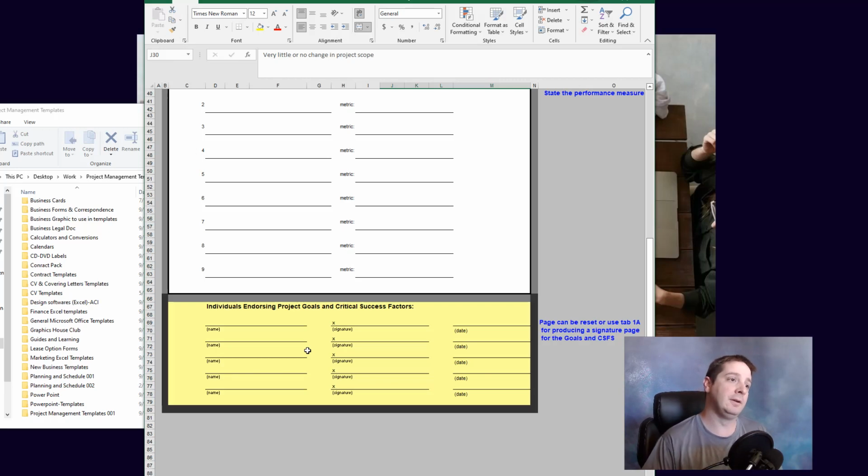That way, the people that are responsible to have this project succeed sign their names that they're going to have this project succeed. And I've seen in the past at very big companies where people will do a project on the side, a bunch of engineers do a project on the side, a big automation project. Then they go and they try to put it on the floor, and they didn't talk to the manufacturing technicians about it at all. Well, the manufacturing technicians have no reason or endorsement for that project to succeed, so they're going to kind of groan, whine about it.